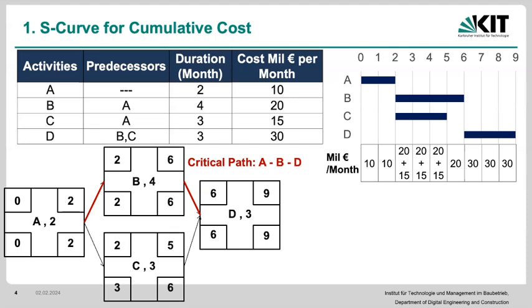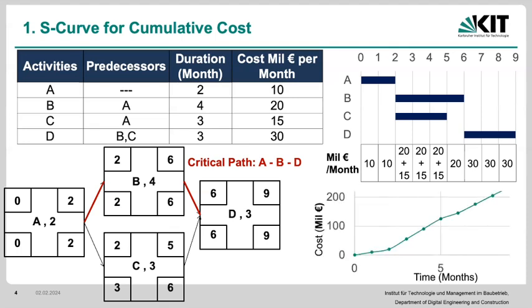Now we've built our resource per duration, right? Or the cost per time in this particular project. So we can actually put it together into either a cumulative system, or inside of a month by month, right? Once we have this, we can utilize it for our earned value analysis, because our planned value is exactly what we have here, right? If you remember, that's the budgeted cost of work scheduled, right? And we're going to be utilizing this in order to see, if we have some limitations in our resources, what is going to happen to them, right?